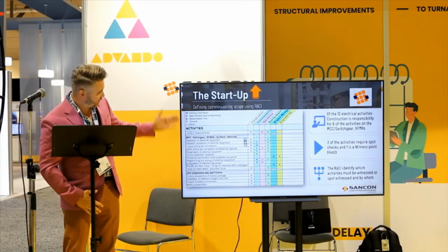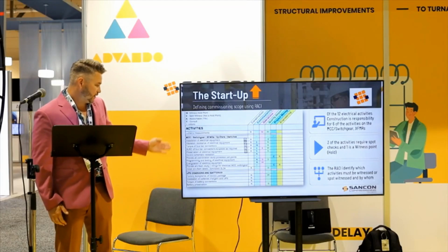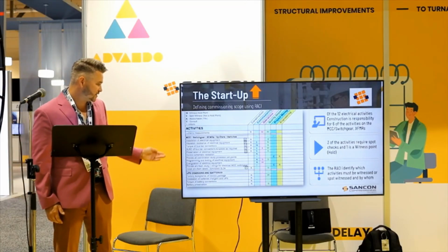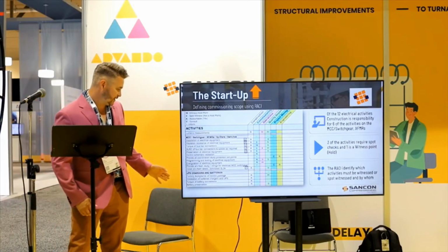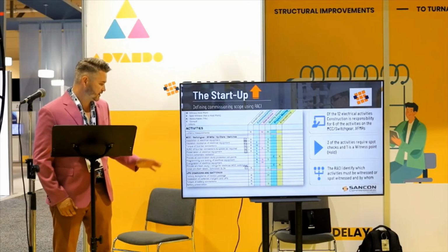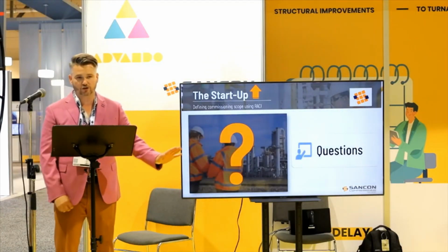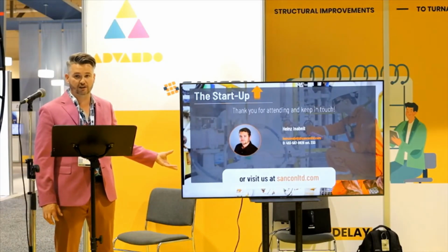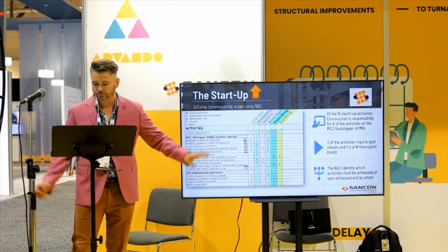We continue along the list here. We'll see torquing of the bus bar, DLRO testing, preservation of electrical equipment, programming and testing of the electrical equipment, energization, installation of arc flash labels, and laminations of the single line drawings in the MCC. So we're putting a lot of detail into this. This is essentially part of our commissioning plan being put into a responsibility matrix.